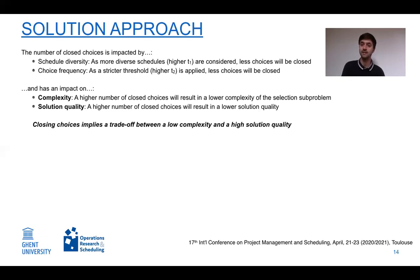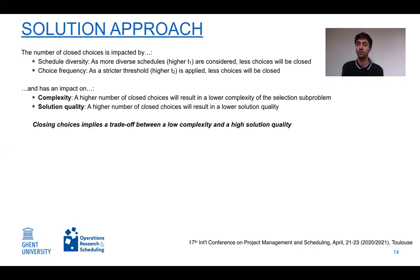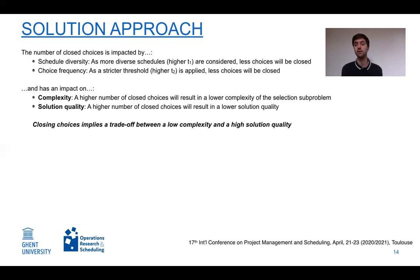To illustrate: when we fix an alternative, either it was the best one — in which case there is no quality impact — or we incorrectly fixed a suboptimal alternative, which negatively impacts solution quality. In other words, closing choices is a trade-off between reducing problem complexity and hopefully retaining a sufficiently high solution quality.